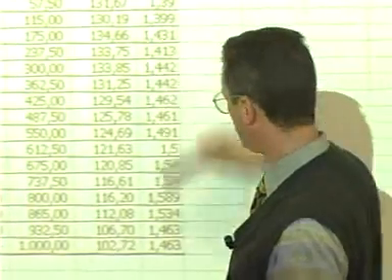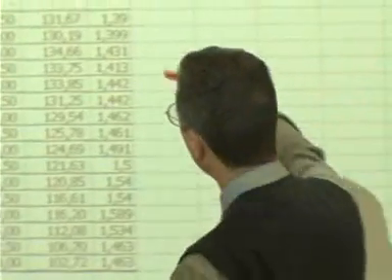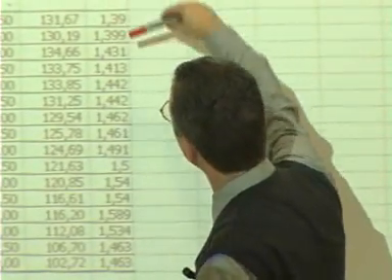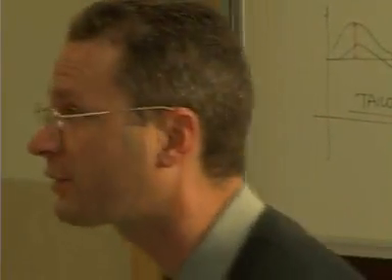Look again at the debt service cover ratio. You will certainly experience a lower level of debt service cover ratio at the end. 1.58 has become 1.46, and again for the final semester. But 1.46 is absolutely comfortable, because 1.46 is much higher than 1.30. On the other hand, in the first 2 years, you can easily see that starting from 1.32, 1.33, I arrived more or less at 1.40. 1.39 and 1.399. And this is absolutely acceptable by banks.